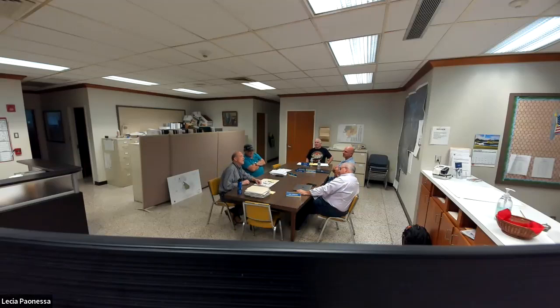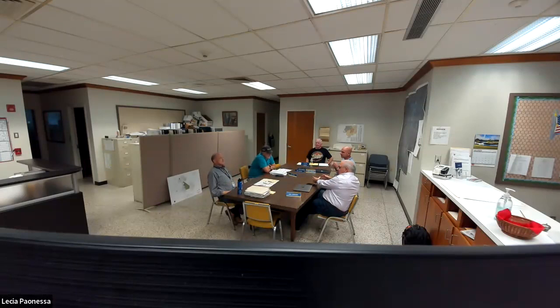No. Oh, I thought it would still be under the purview of the PVC. No, because every time we'd have to have them sign on the change order for the job. As soon as it comes out, we don't have any way to hold it. The only way to hold money is on the project level. So as soon as we give up that ability to hold it at the project level, it goes back to the town. And then the town controls all the contingency dollars.